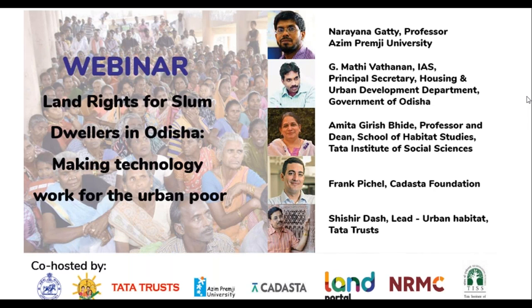Odisha leads the way in becoming the first state to validate the need for future-forward technology such as drones and geospatial tools in the delivery and implementation of large-scale systemic programs such as land rights and livable habitat. There is future collaboration for research and documenting the learnings from the project. One of the heartening learnings from the project is that, after using all this technology, it is one of the low-cost projects for execution. For each family, we have spent about 800 rupees, and the beneficiary has got 30 to 60 square meters of land and housing support and other infrastructure support for each household. Thanks.